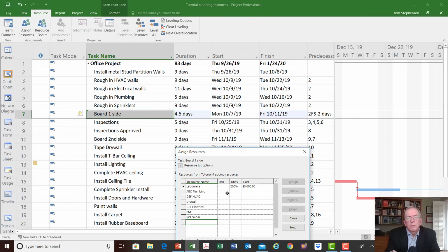Do you see how there's a problem with that? It's not going to work at a certain point. It might work pretty well for going from 2 weeks to 1 week, but there's a law of diminishing returns. At a certain point, it doesn't work linearly. It's not an equation that you want to follow in a linear fashion. So you have to be very cognizant of that, because maybe that's not what you want.